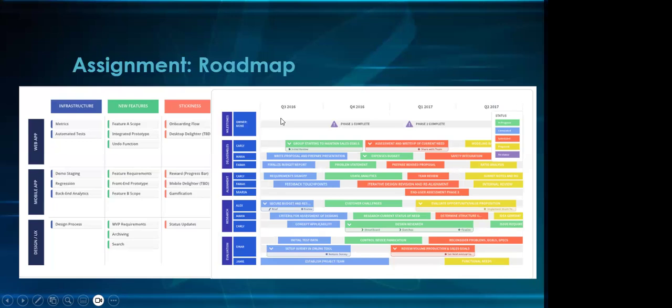If I'm going to set out my roadmap, I'm going to say that my homepage will be completed in 2 sprints. Then I would say, okay, sprint 1, the menu will be completed. So I'll create maybe a block or a line or an arrow, which will be the menu, and that will go across 2 sprints.